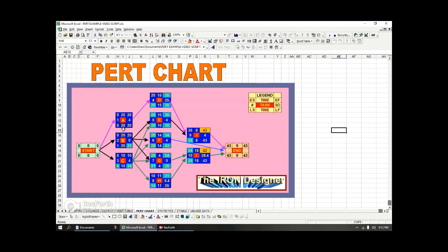So the early finish went from the moment I start A with the duration, an expected time of 20, because we have to go with the TEs. And I'll note that here, that the early finish is 20. We can't really look at the late start, late finishes right now till we go completely through the Pert chart, and then we work backwards to calculate these bottom numbers, the LS and the LFs. They get calculated by subtracting the TE values from the CPM.